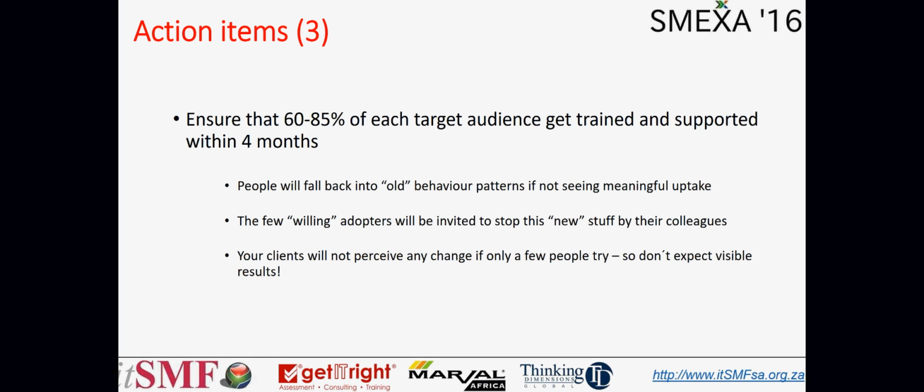Now the 4 months on this page is just an indicator. If we're talking South Africa and you're starting your project in December, well, then make that 5 or 6 months, please. But that's basically a period of time in which we want to make sure that there's no major holidays or something. We can concentrate on getting stuff done. If it takes more than 4 months, you're going to see that the first people are dropping off already before the last ones actually come on the wagon.